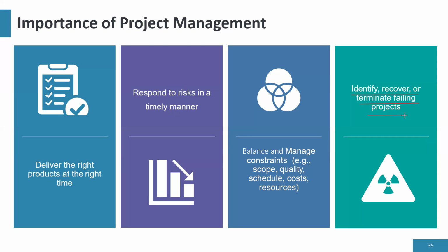If benefits are no longer realizable, you should stop the project, and benefits most times mean money. So if you're working on a project where there are no benefits, that's when you should say stop. If there are potential benefits, maybe we can try to recover or restructure the project. But the moment benefits are no longer realizable, that's when you should stop the project. Project management helps us to do that.